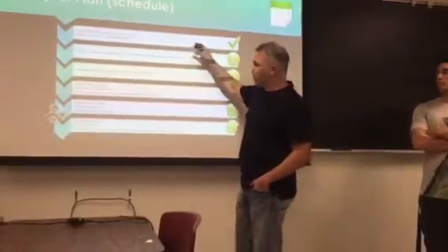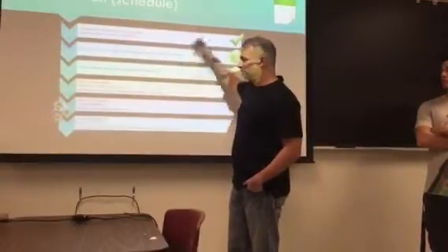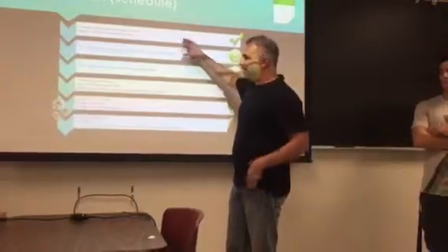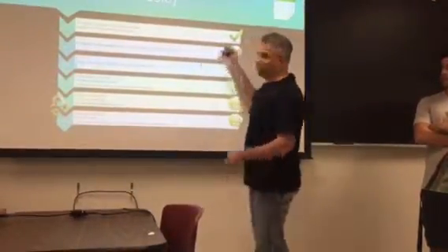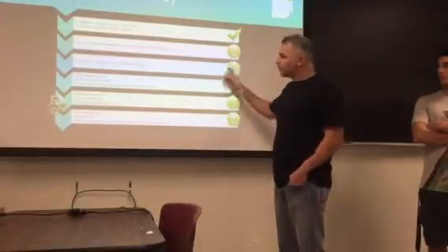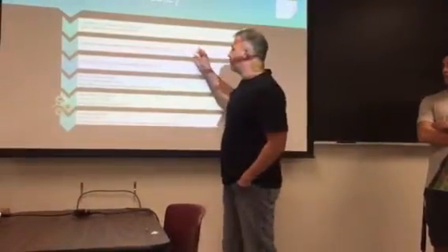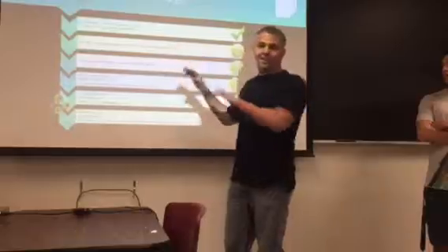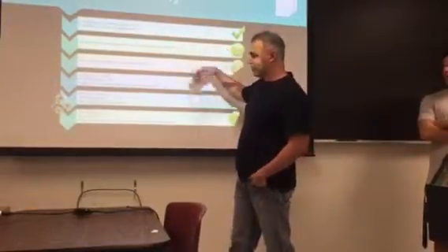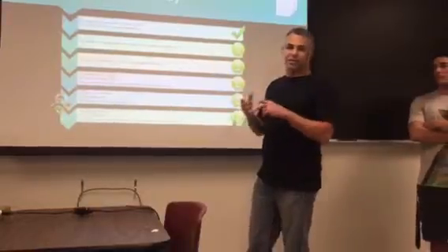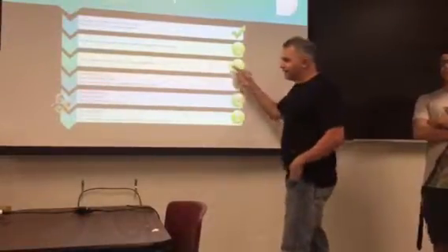I won't go into all the specific details, but one of the things we noticed quickly is each week is pretty full with some pretty key things that have to happen, and if they don't, we could fall behind schedule. Some of those things, for example, are collecting all the client content that they want. So we've got to make sure we have that on time and everything is correct, especially any artwork, any letterhead material, like logos, things like that.